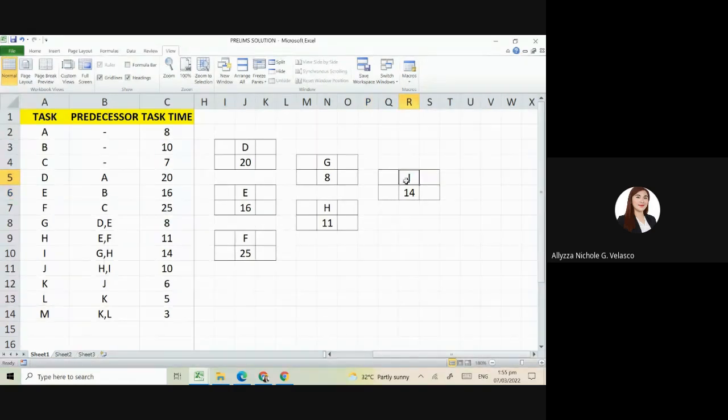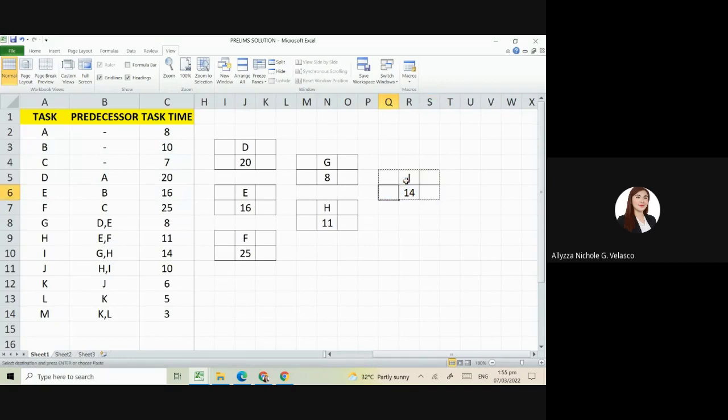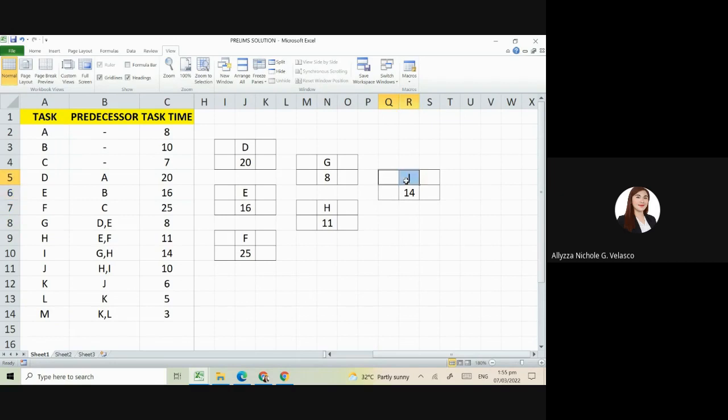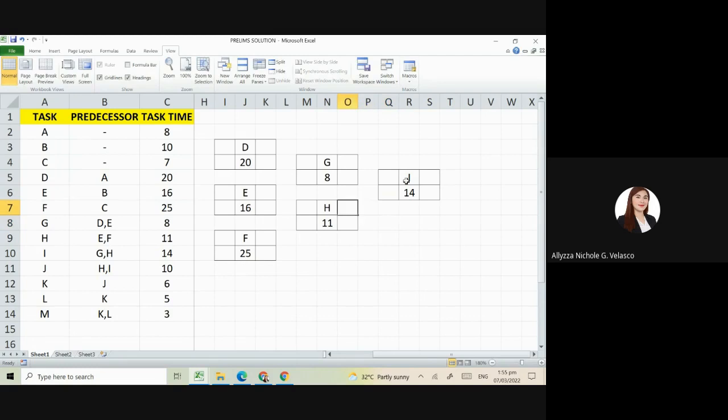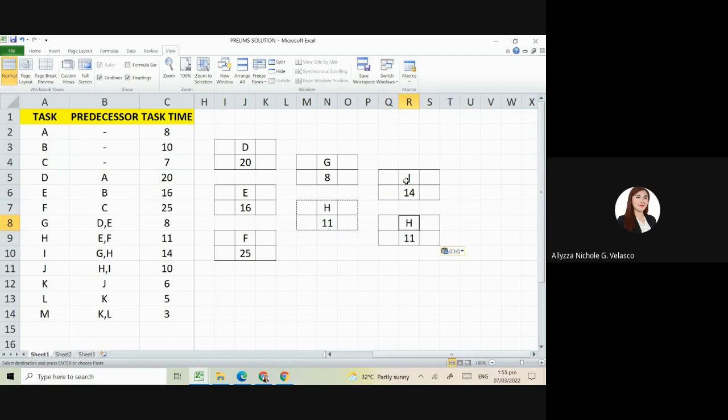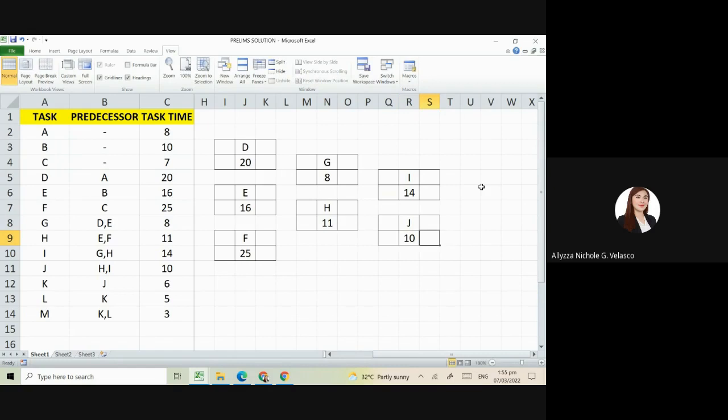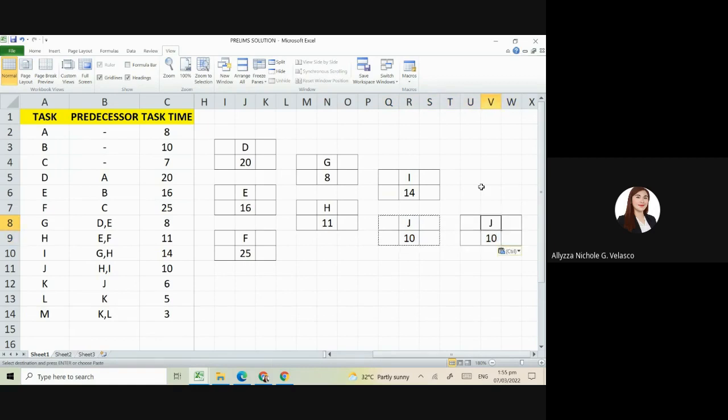Next is J. Its predecessor is H and I. Let's place it near H and I, having how many days? Our days is 10 days. Then K, its predecessor is J. So we'll place it here beside J, having 6 days.